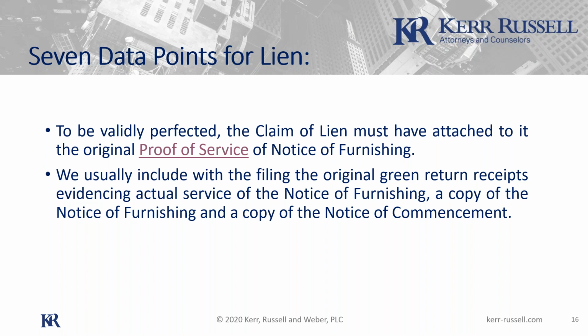And another thing about the lien I want to talk about briefly is the risk of overstatement of the lien. So I mentioned that you can put in the lien your contract amount, and then you can put in good faith extras. So say you had a $100,000 contract and they gave you 10,000 in change orders. So you both agree, you and your customer, that the contract amount is 110,000. And then let's say you've submitted some requests for change orders for another 5,000 they haven't accepted, or that they're fighting with you about. You'd still put in that 5,000 into your contract amount. So you'd be going for 115,000 in my example.